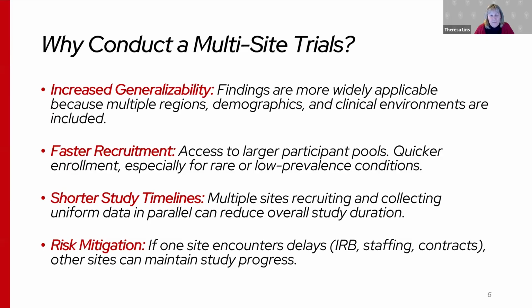Shorter study timelines. Multiple sites recruiting and collecting uniform data in parallel can reduce the overall study duration. And risk mitigation. For example, if one site encounters delays, such as from the IRB or staffing issues or contracts, other sites can maintain the study progress and keep on going.